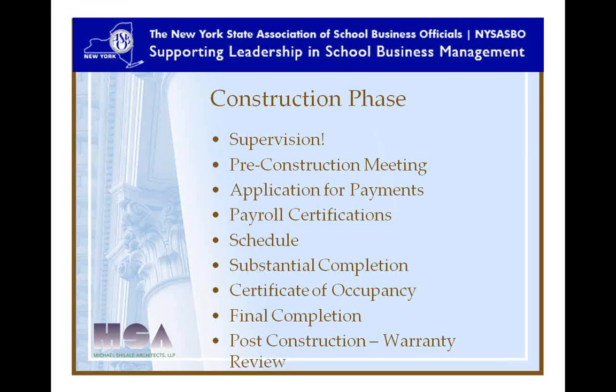We manage that phase very well, and we try to encourage our clients to either bring in a construction manager, clerk of the works, or bring in more site time for their architects or engineers. Because so much happens during construction that we want to try to smooth that process out, whether things get damaged or leaks happen or you find wet insulation like we did this morning. A pre-construction meeting is critical to set some of the ground rules, and those periodic meetings are also critical.